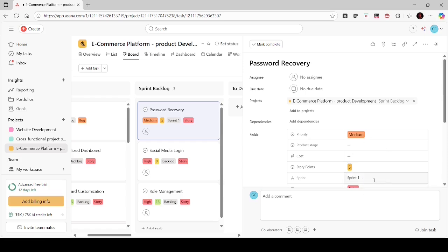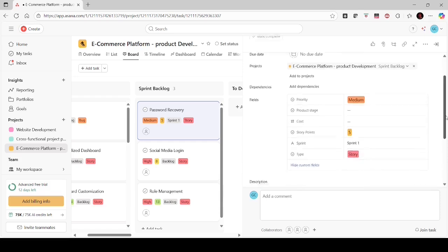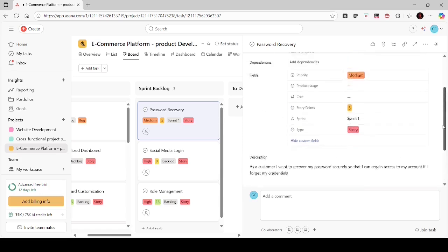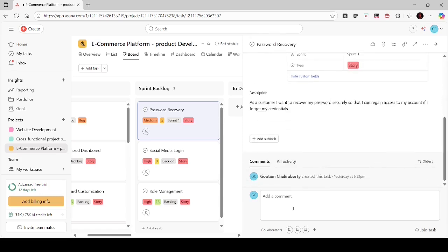I updated it as sprint 1, and also during the sprint planning meeting we shall have to identify what will be the different subtasks associated. The definition of done needs to be identified earlier, but not during the sprint planning. But here we identify what subtasks will be there, and if any other additional requirements are there, maybe we shall have to capture any file or document, everything that we can do.